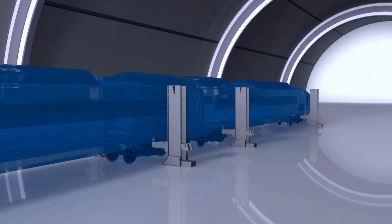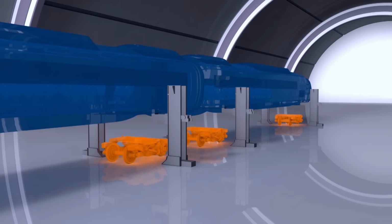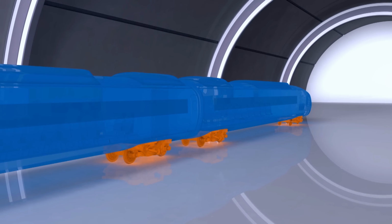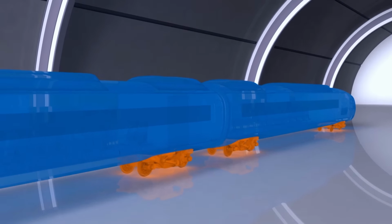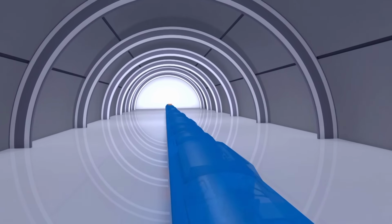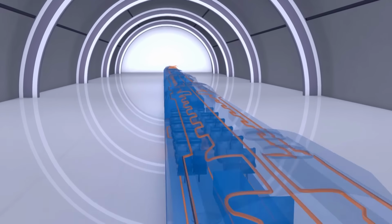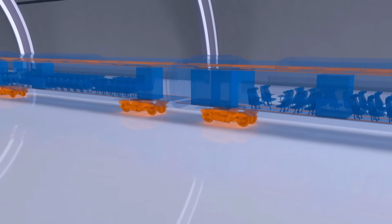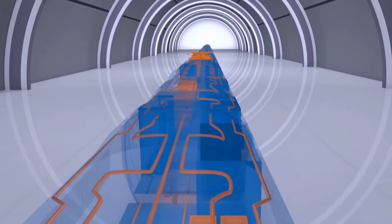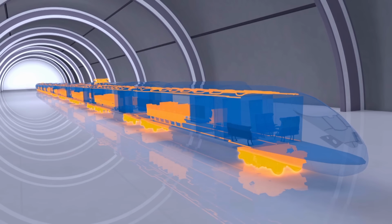The most complex of all the processes involves lifting the train and removing and replacing the chassis. While this is going on, the other half of the train is repainted. They also have to replace the pantographs and overhaul the onboard electronics. Inside, all 604 seats will be checked and repaired. They will only be able to meet the delivery deadline if everything goes according to schedule.